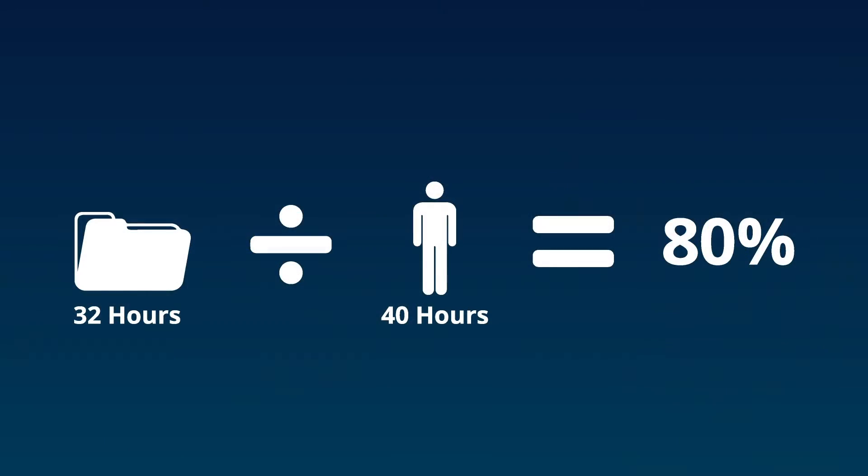For example, a senior engineer is assigned to 32 hours of work across four projects during one week. That same engineer during that week has 40 hours of capacity to give. This means that the engineer is 80% utilized.